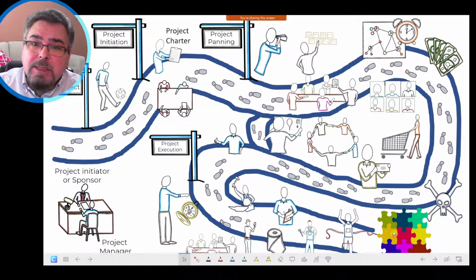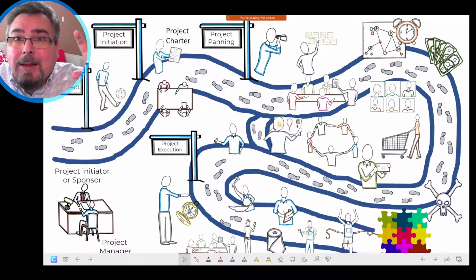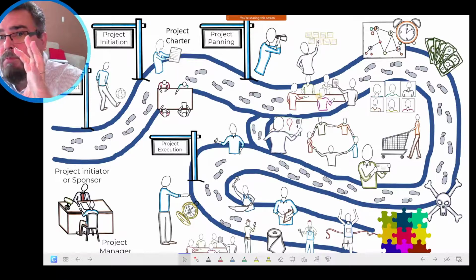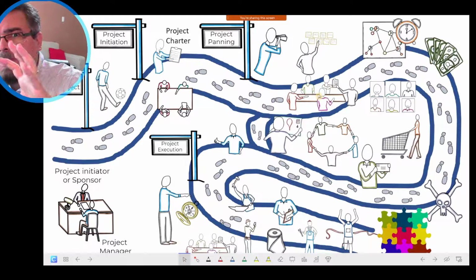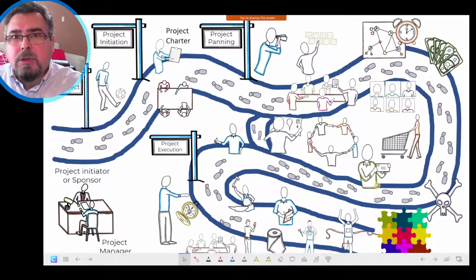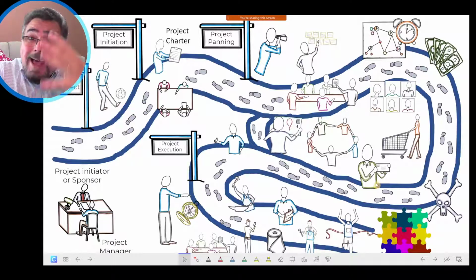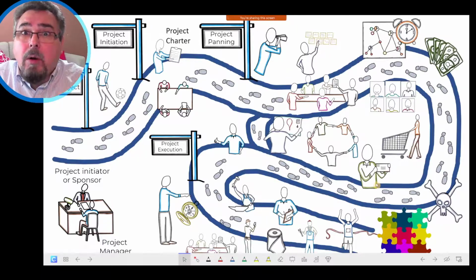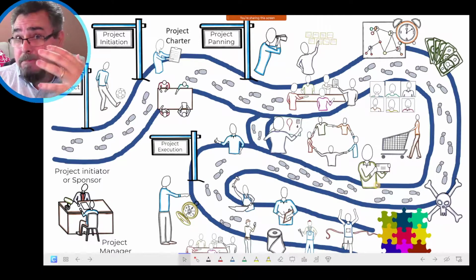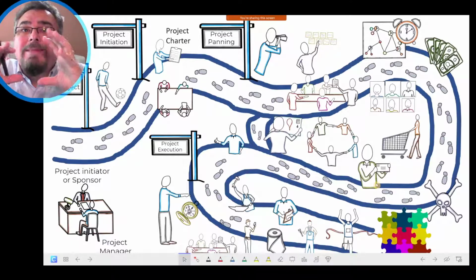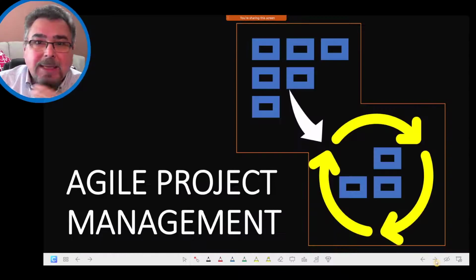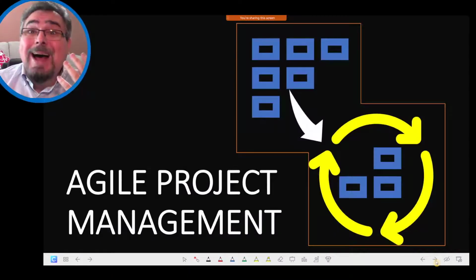So what's important to understand here? In that type of approach, a linear project management approach, we plan all the work packages together, all the activities at the same time. They get a schedule, human resources, budget, procurement, risk, and communication. That's very important. In that type of environment, we try to anticipate all the tasks, all the problems, risks, and budget, and then we start execution of the entire project together. That is different from what we see as agile project management or adaptive project management.